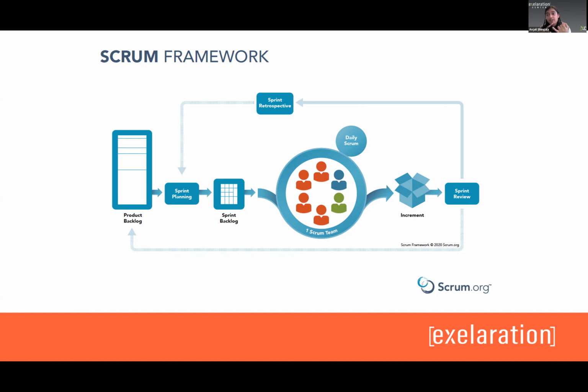We're going to bring in a navigation bar, a header, and a user login page. Those are the features that we're going to be bringing in for us. Fantastic. From there, we go to what our sprint backlog is. So planning is what do we want to bring in? The backlog is what we are bringing in.